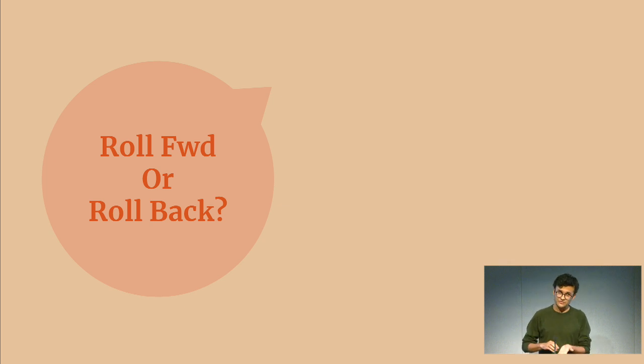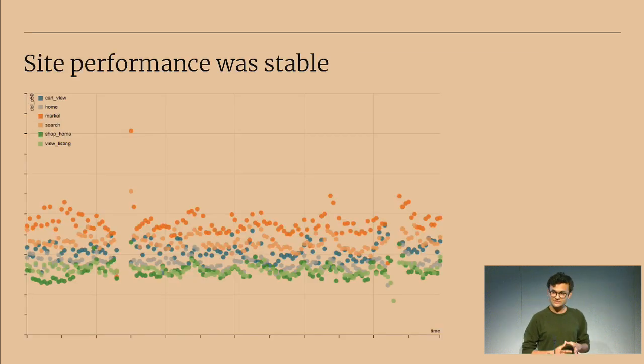There were some metrics that we were going to watch for the next few weeks in order to make an informed decision about what to do. So things like performance regressions, impact on our sales, operability of the new platform. If it was super noisy and pagey, we didn't want the people getting the pages to suffer for the next many months. But actually, it was all right. It worked out pretty well.